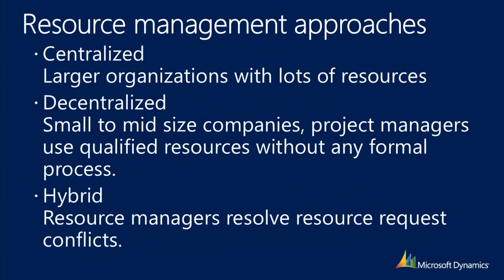Again, when we look at different organizations, there seem to be three models of resource management. Centralized resource management, when it is a very controlled and focused environment, where there are one or many resource managers supporting different categories of work or regions, and requests for resources go to them, and they are in charge of finding qualified resources and making them available for project managers or the people that have requested those resources.